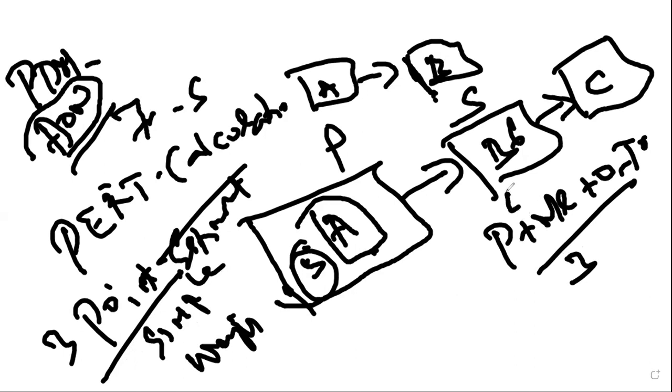And if you bring in 4 multiplied by most likely, and in the denominator, instead of 3, you bring 6, that becomes beta. So beta gives you a weighted average. Triangular gives you a very simple average. So this is called the PERT calculations. This is how the estimation is calculated for each and every activity by the planning engineers. Now it is understood. Is it understood or not? Yes. Okay.